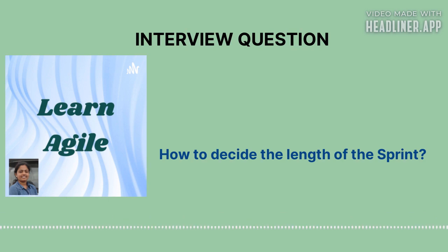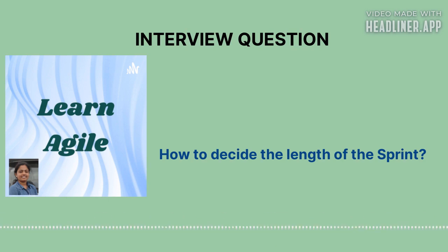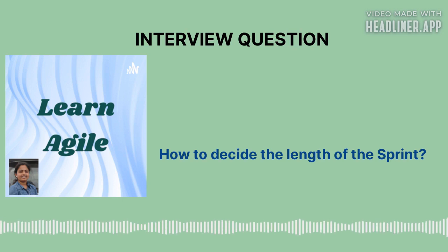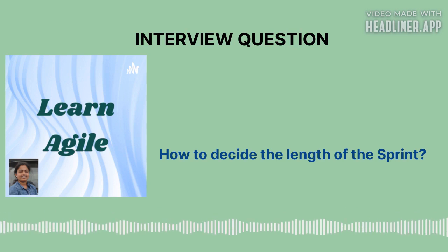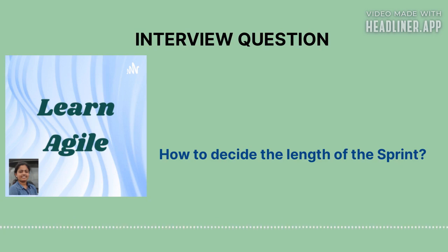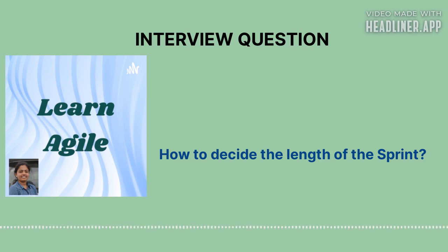Whereas on the other side, as we mentioned, we are not so sure. We are still in the deciding stage. We are not having the complete clarity whether we will be taking this approach or whether we will be dropping this approach. Entire decision is going to happen by reviewing the working product at the end of our first week. So better not to spend so much time like 2 to 3 weeks implementing so many things and then deciding, oh, this is not the one that we need. Why we need to spend this much time? We need to drop it. So 3 weeks effort is going to be wasted.